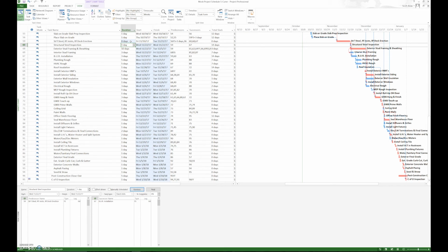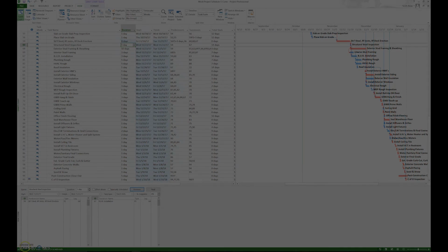So very important, we come back around after we do things like add calendars, add resources, reduce excess float, and look at redundancies. We make sure we have a closed network, not an open network. And when we do those, we're going to extend the duration. We need to come back through and compress the schedule to fit into the time frame allotted. So that pretty much covers step number 14. Very similar to step number 10, except you're doing it again at a later point.